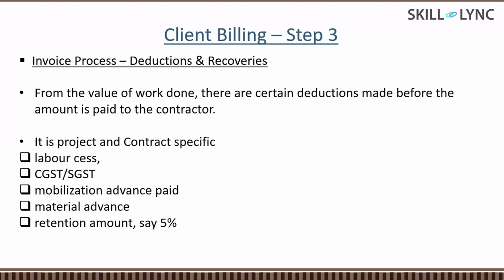So we know GST, but GST is of two types, central GST or state GST. All right. So suppose the client has given some mobilization advance to kick off the project to help the contractor, so that they will be recovering it on a monthly periodic basis. Similarly, one more is